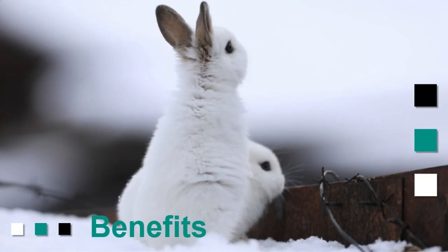That's another thing we see people do. They go after live P6 data. If you reschedule, if you add a new activity and you change the logic, you put the wrong logic ties, or you change a duration by mistake, the whole schedule can change. So it's dangerous to report on live P6 data. We want it to be controlled. That's really the benefit of using P6-Reporter.